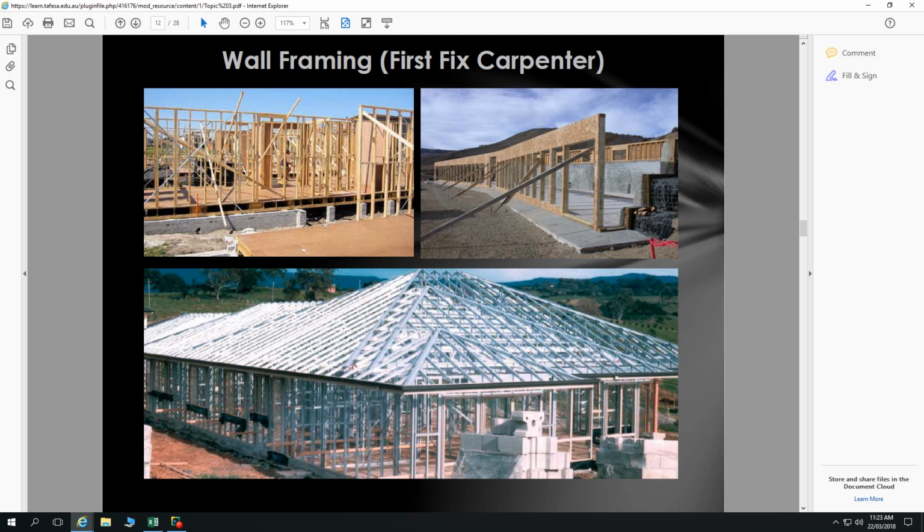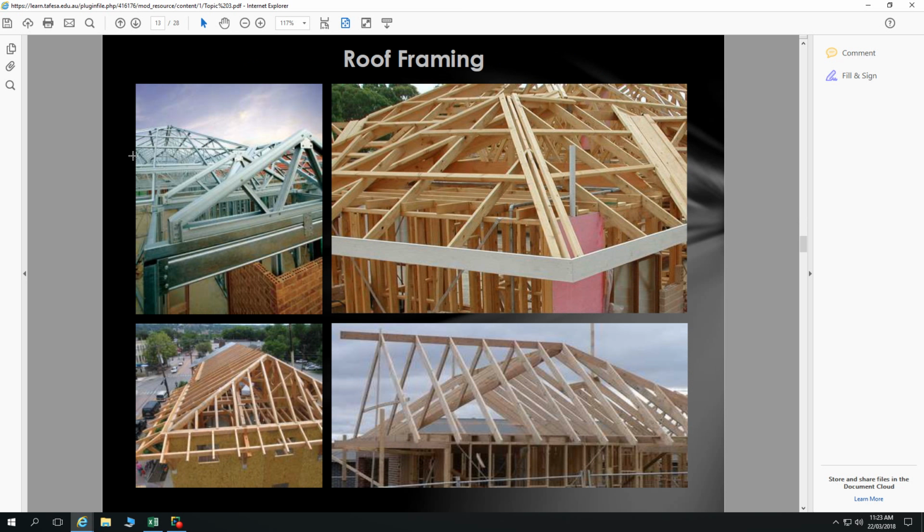but of course that's for a very standard house. Once you step out of that standard, you might have to allow a week and a half, 2 weeks or something for your structural framing. That's going to have implications on your schedule, and you're going to have to know when to speak to your carpenters about that for your scheduling. So then our roof framing can happen fairly much just following shortly after our wall framing.